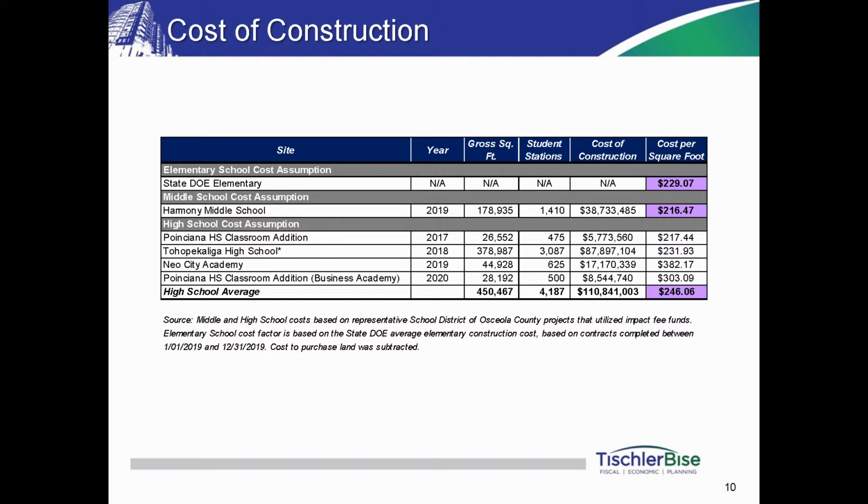Because right now, in full honesty, I spoke with Mr. Clench the other day about Gateway High School, because we were just doing the modification. And I talked to a couple other people too, and he said it's hard to even get anything less than 300 a square foot, 320 if you're lucky. I confirmed that with other folks, and they agreed. Less than 300 bucks a square foot, you're not getting. So there are 2 outliers. Even Toho, 2018, that was a long time ago. If we were to recreate Toho, I was told it'd be north of $90, $100 million easily.